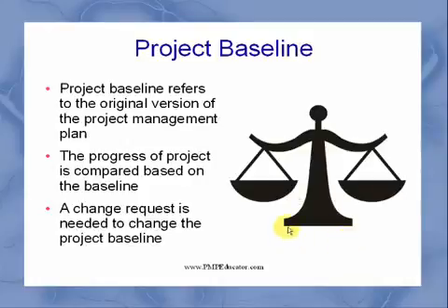For example, if you want to have certain things done on a certain date at a certain amount of money, and by that date you haven't achieved that goal, that means you need a change request to change the project baseline. So the project baseline is basically a scale where you compare your progress as you progress through your project life cycle.